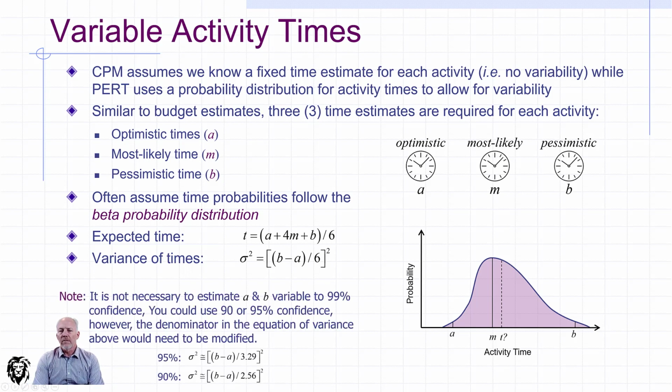Now, we didn't really talk about this when we were talking about cost, but it's probably worth appreciating that this formula is set up assuming your estimates for most optimistic and most pessimistic are at the 99% confidence level, and that may or may not be true. And to be fair, sometimes the mathematics can get away on us, where we're applying judgment, and then the math forces us into a refinement which we're just not working at.